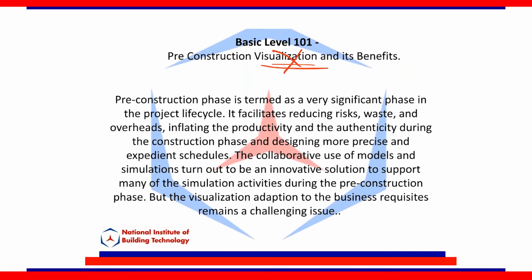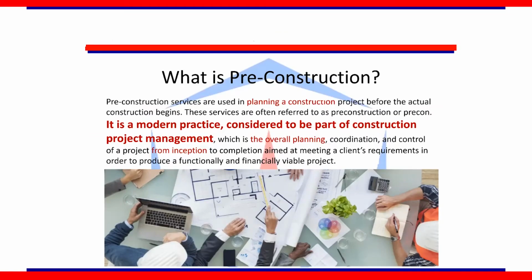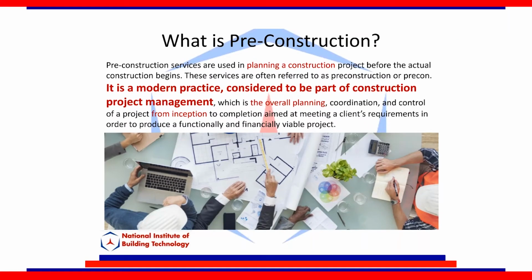See how it is different? They don't go and hire a contractor directly. First they hire a contractor to run a pre-construction process. Once the pre-construction process is complete, they might hire the same or some other contractor to go perform the work. Okay, that's why it became distinctly different, and that has been the practice more and more that I see. It is typically the process where you have a design-build setup. Sometimes you have IPD, which is an integrated project delivery setup. So what your contract deliverables are depends on how strong the pre-construction process becomes.